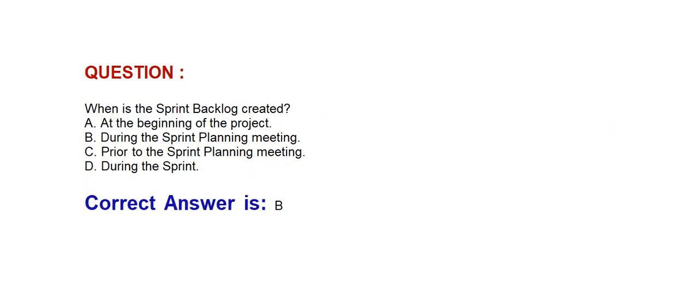Next question: When is the sprint backlog created? Option A: At the beginning of the project. Option B: During the sprint planning meeting. Option C: Prior to the sprint planning meeting. Option D: During the sprint. Correct answer is Option B: During the sprint planning meeting.